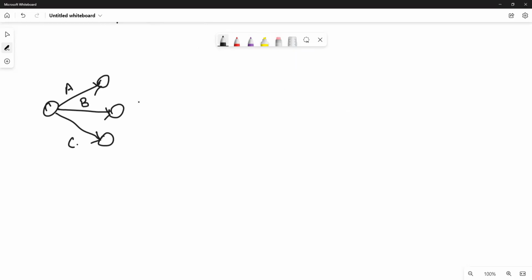But one more thing you should see is whether D is alone or together with something else in the predecessor column. Yes, D is along with B. So B and D are together: after completion of A, D starts, but D and B are together. So you should merge D and B at a single node. Next, after completion of A, E starts. See in the predecessor column whether E is alone or along with some other activity. E is alone, so you can write it. After completion of A, E starts.